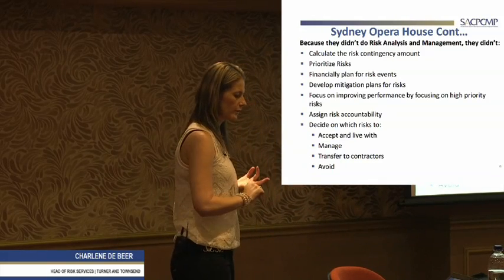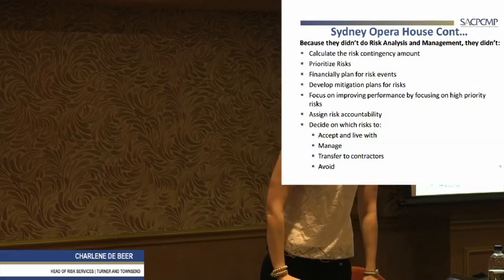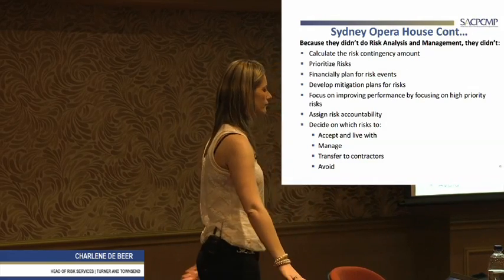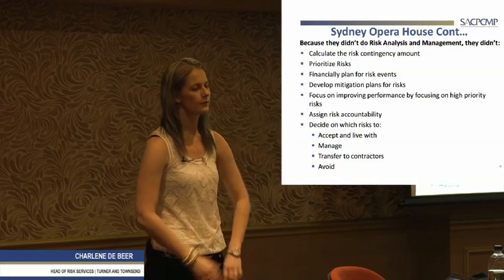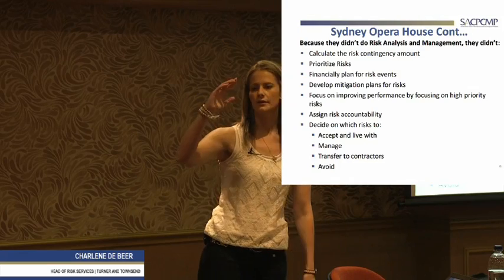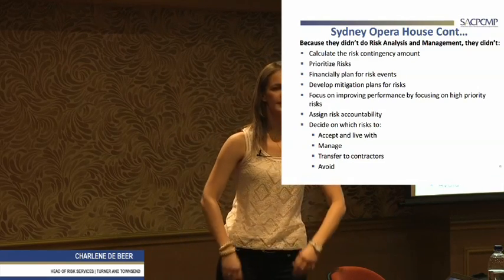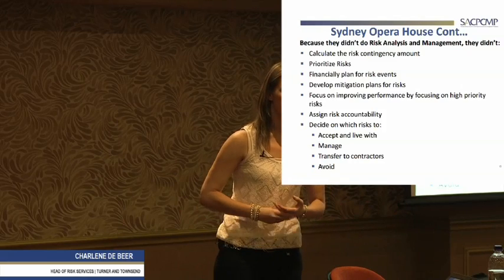Secondly, for every week we overrun and the client can't operate this facility, he is losing 5 million rand in revenue. So for 4 weeks, the client's going to lose 20 million rand, and your contractor is going to charge you 2.5 million rand a week. So basically it boils down to 30 million rand.